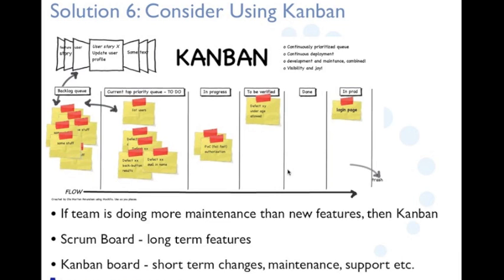Within Kanban, the granularity of what you actually control is at the story level, whereas in case of Scrum, the granularity is at the sprint level. So Kanban has much better control that we could exercise, particularly when the situation is highly dynamic. So this is one way.